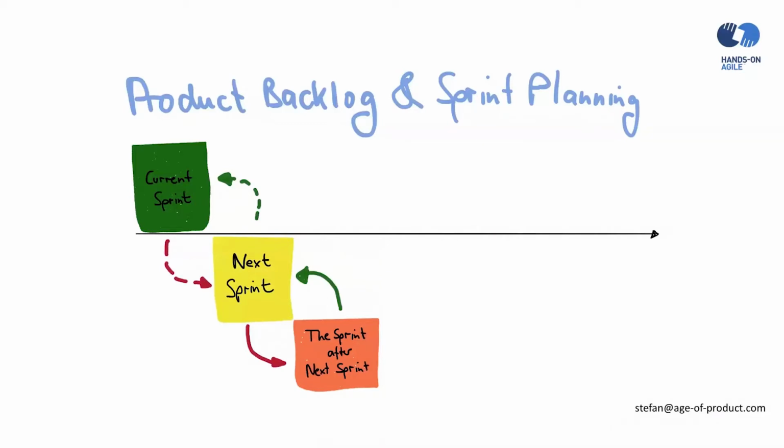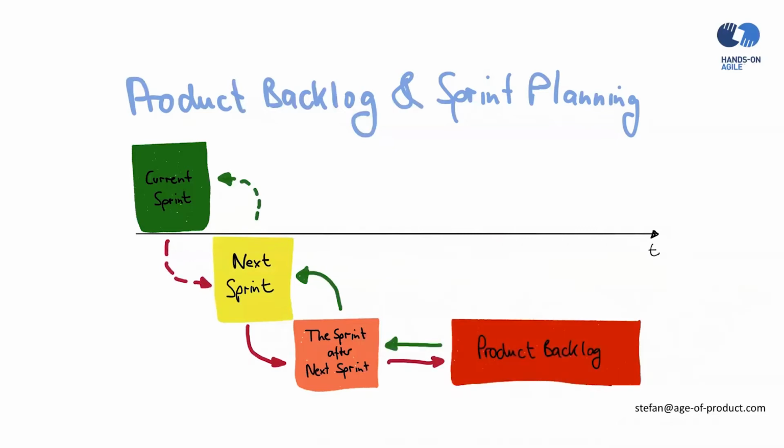Maybe it's 6 weeks or 8 weeks, depending on how your team works, whether it's B2C or B2B, whether you ship your product in releases or whether you practice continuous deployment. You have to take the state of your product lifecycle into consideration. So a lot of individually contributing factors here. But in general, it proves to be a good thing. So what we do religiously is we have our product backlog refinement sessions once a week.